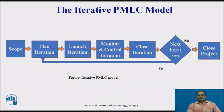Closing an iteration is not the same as closing the project. The Iterative PMLC Model requires a solution that identifies the requirements at the function level, but might be missing some of the details at the feature level. In other words, the functions are known and will be built into the solution through a number of iterations, but the details of the features are not completely known at the beginning of the project. The Iterative PMLC Model embraces several types of iterations.